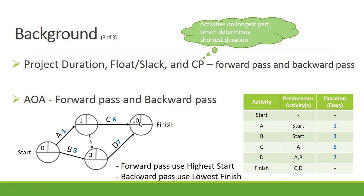Our project duration is ten days. For the backward pass, we start with ten. Ten minus seven is three, ten minus six is four or three — we use the lowest finish, which is three. Three minus one is two, three minus three is zero; the lowest finish is zero. To calculate total float, it's finish minus start: zero minus zero is zero, three minus one is two, three minus three is zero, and ten minus ten is zero. Our critical path is where total float is zero: start, activity B, D, and finish.